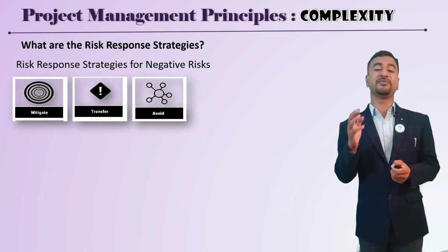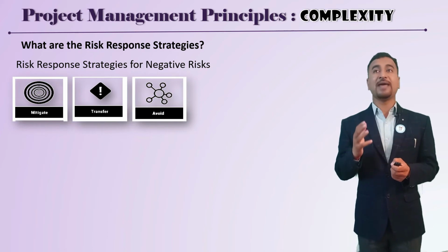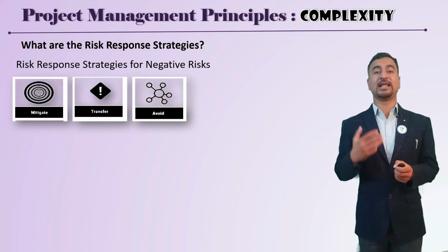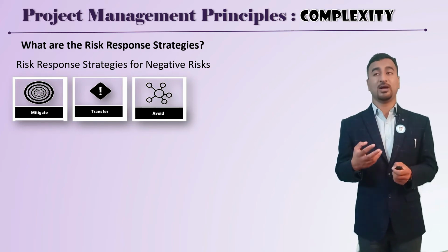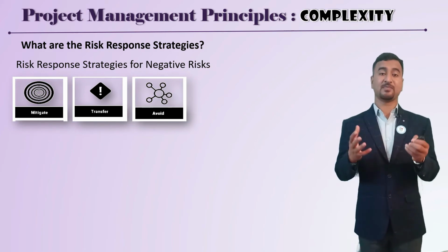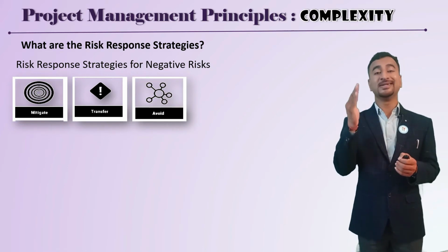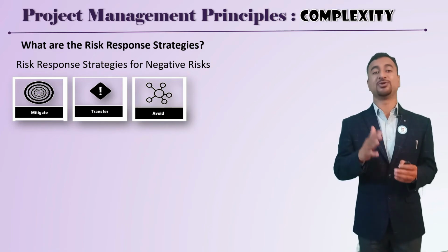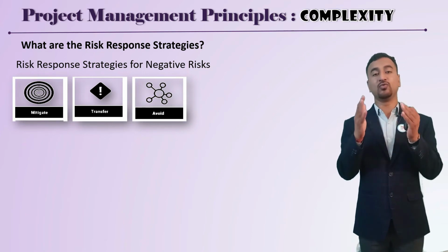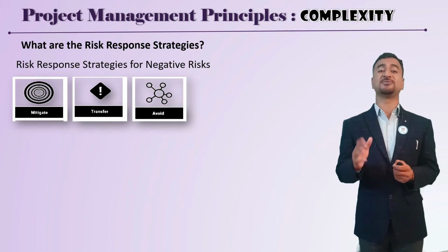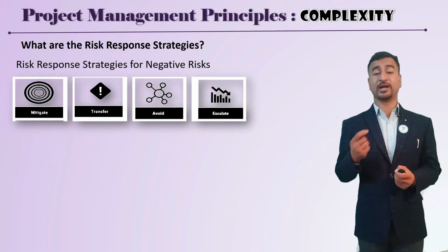This is the strategy we can incorporate when the life of a person is in danger, like when we are dealing with some nuclear things or some experiment with bioweapons, where human life is in danger. We scrap the entire project instead of going with that risk. So that is where avoid is, when you drop the entire plan. That is a risk response strategy. That is the last stage, but that is something you can deal with.